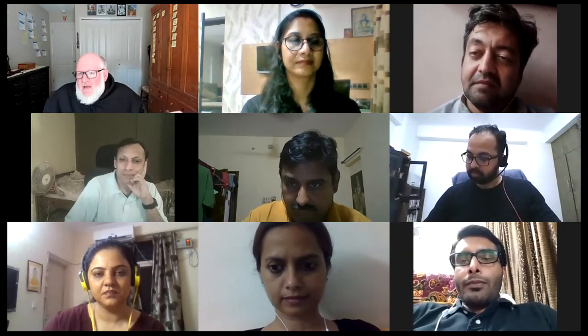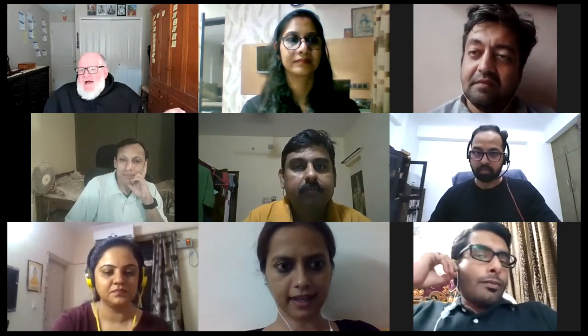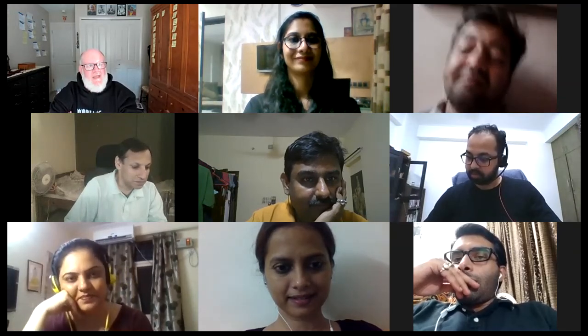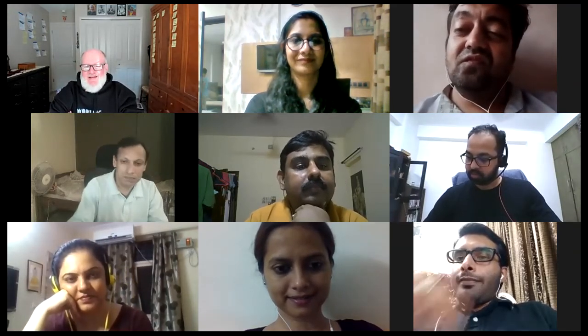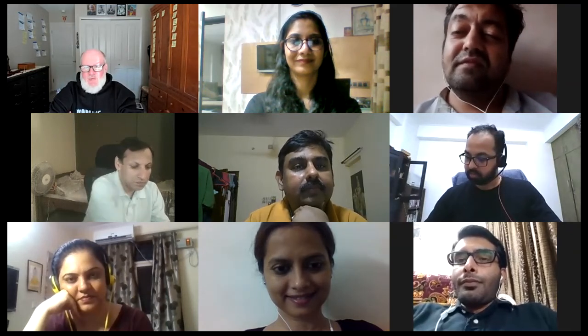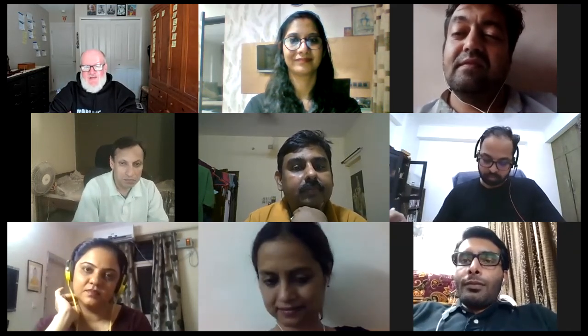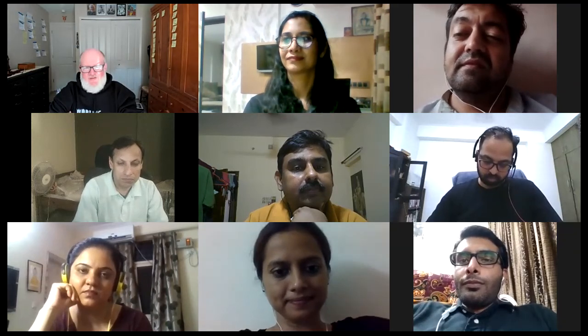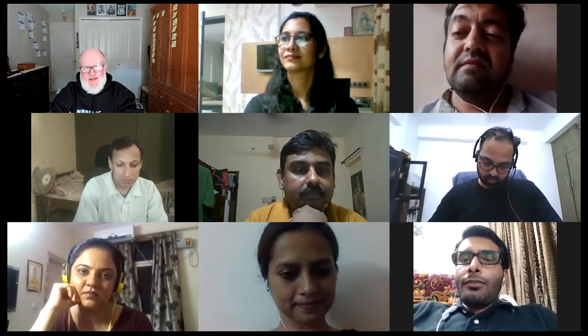All right. I thought I saw one other question in here. Shweta, how do we set Scrum Masters free from status reports, dashboarding, and other various things? Because those are indeed impediments sometimes if you're spending all your time reporting. I have a rule of thumb that I do with Scrum Masters: I want to be able to walk into the team space, look at the artifacts on the wall and look at the team, and tell everything that's going on with that team within 2 minutes without ever asking anybody any question.